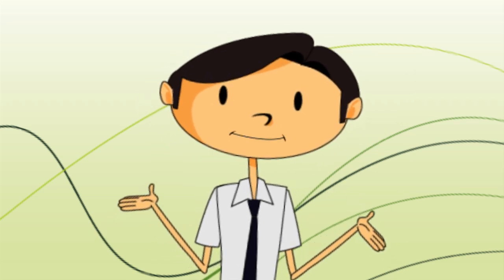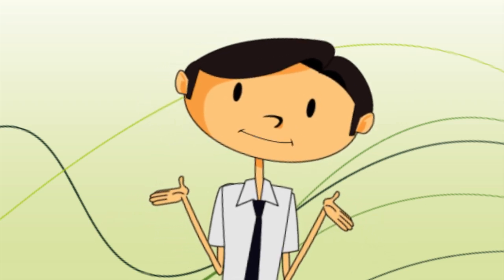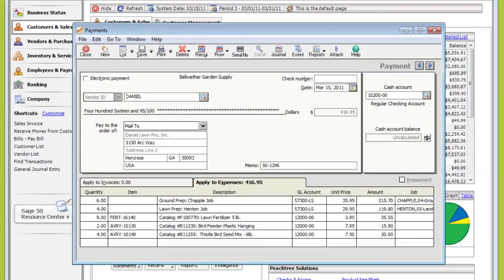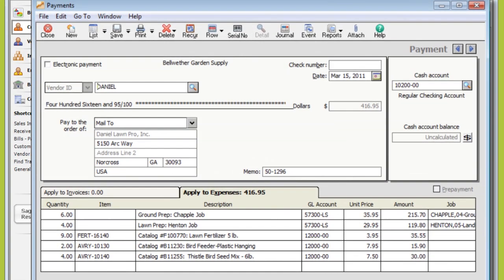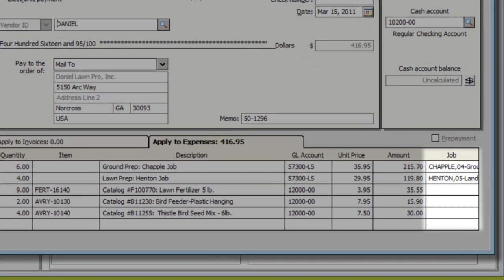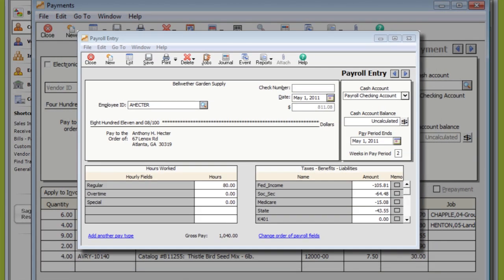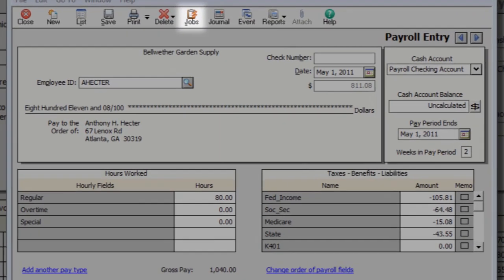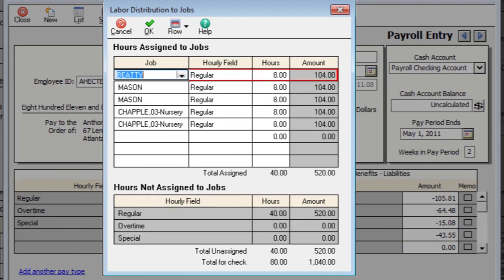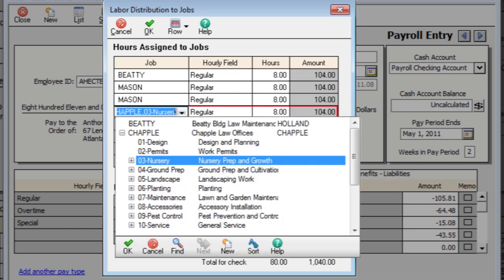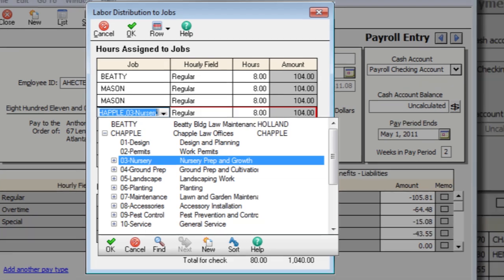Now how do I track my current costs? You can assign expense transactions to job records, job phases, and cost codes. Any expense can be assigned to a job. Purchase invoices, payments, payroll hours, inventory adjustments, anything. General journal entries and time ticket hours can be assigned, too. And if you want to group certain expenses to report on them later, set up cost codes.